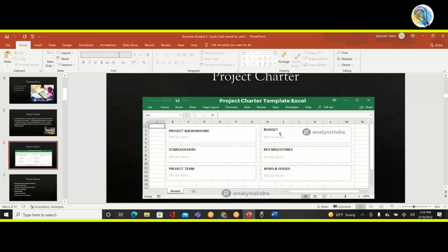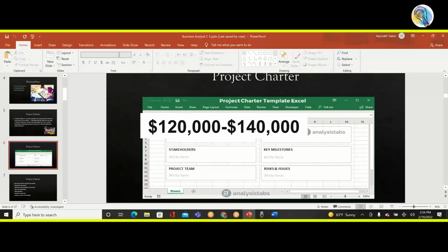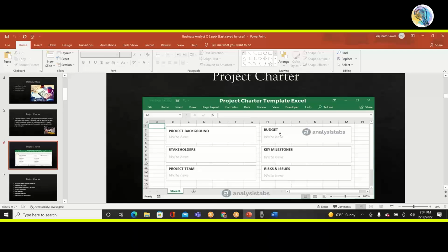But if it's going to be a mid-level of an experienced, a 10 to 12-year experienced contractor, they're going to charge anywhere between $200,000 minimum. If it's going to be a full-time employee per year, it's going to be at least 120 to $140,000. That's minimum, right? Somebody with 5 to 10 years of experience, 10 to 12 years of experience, something around that range. So everything would factor in when it comes to budget. So a 2 year project could be around 12 to $14 million.